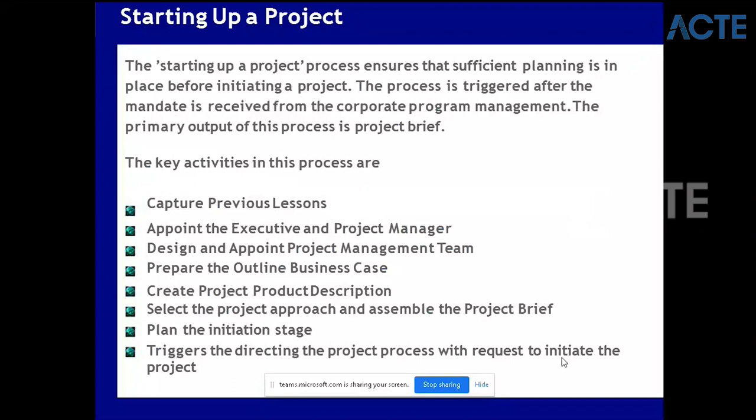Starting Up a Project ensures that sufficient planning is in place before initiating a project. The process is triggered after the mandate is received from corporate or program management. The key activities in this process are: capture previous lessons learned, appoint the executive and project manager, design and appoint the project management team, prepare the outline business case, create the project product description, select the project approach, and assemble the project brief. Then plan the initiation stage and trigger the direction of the project with a request to initiate.